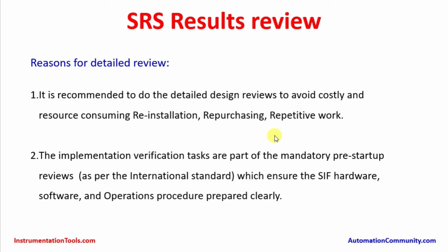If there is any mistake, there could be a delay in the project schedule, which may call for a reinstallation, or if it is a wrong specification, it may lead to a different product than what should be installed. So it may call for repurchasing, which is going to take more time, and repetitive work. Again, preparation of the engineering drawings, documentation, new logic programs, and testing, everything is going to take time. So these are the things that can be avoided if it is done in a proper way.